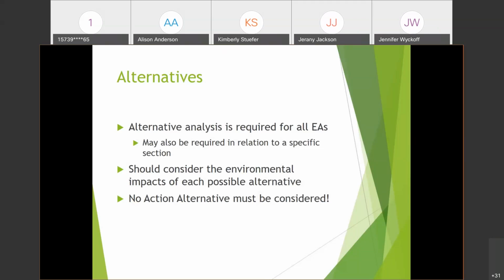And you also should identify other reasonable courses of action, explain them and how they were considered and not selected, such as other sites or design modifications or other uses of the subject site. And you should also include benefits and adverse impacts to the environment for each alternative and the reasons for rejecting it. And you also need to consider the no action alternative. What would happen if this project did not occur? You would want to explain the results of taking no action.